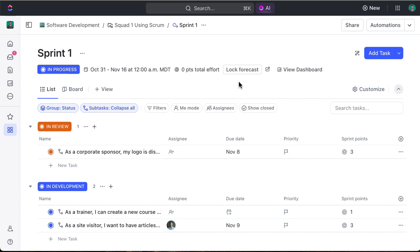Then being able to lock your forecast so for your reporting purposes you can track what you indeed planned for and what actually happened, creating another level of support or visualization for your BI needs. Lastly, a piece that's very exciting is there is now a way to interface with the ClickUp dashboards directly from a sprint, so clicking view dashboard will pre-populate a burn up and burn down chart for you.